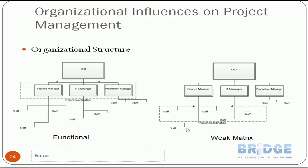However, there are disadvantages. This person is a coordinator, not a manager — he's not empowered enough to manage a project, only to coordinate and expedite it. He also still has his daily operations on top of the project coordination work. Other staff are similarly expected to handle project work on top of their regular daily operations.